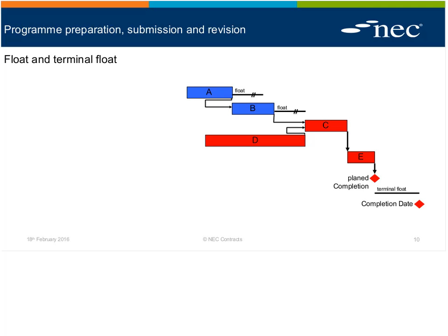Okay. So this can't be used to absorb the effects of compensation events. So that becomes the contractor's. Absolutely. There's no such guidance on any of the rest of it. It says to us that the planned completion moves by the amount of the compensation event, but the contract doesn't mention what you do with float. So it's widely accepted that float can be used to mitigate on a kind of first past the post principle.